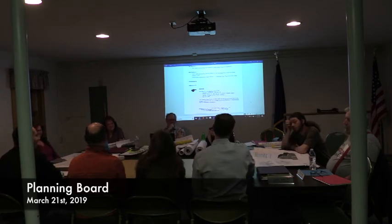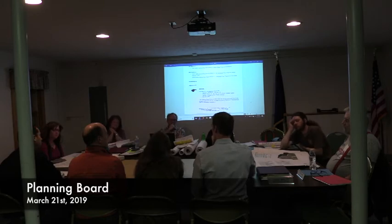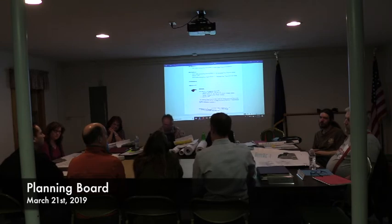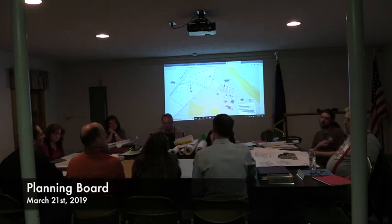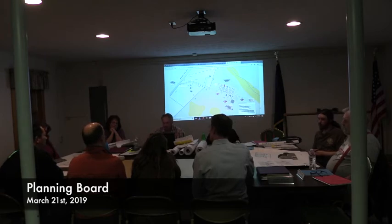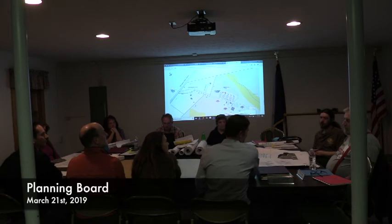But the very first inquiry we got was for 200. We wanted to keep it finite. With Tom Milligan doing the septic, we looked at where we wanted the barn, the shortest runs, the available leach field area. We looked at the lower level, but it would be a long run. So it turned out the best place was that. The bigger you get, the more it requires, so we thought we'd keep it modest. The two houses would pipe into it as well. He did all the actual leach field subsurface disposal application, ready to submit with everything else. Maybe the day comes we can do 2 on the property, if we're successful. Maybe we find the trout pond and that's where we're going.